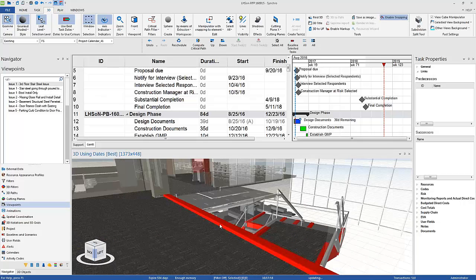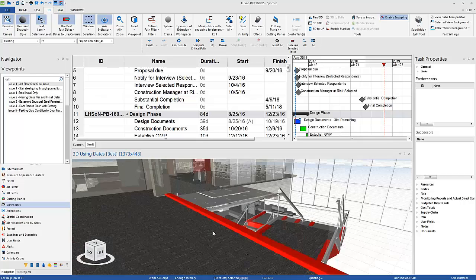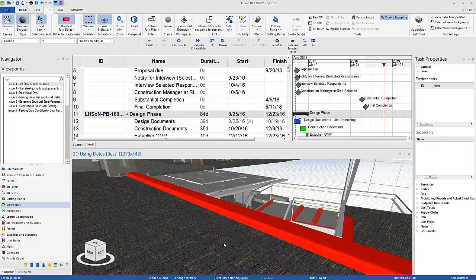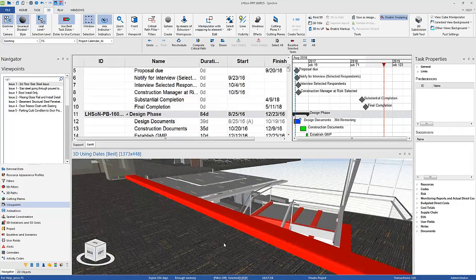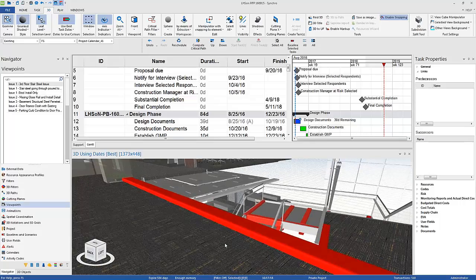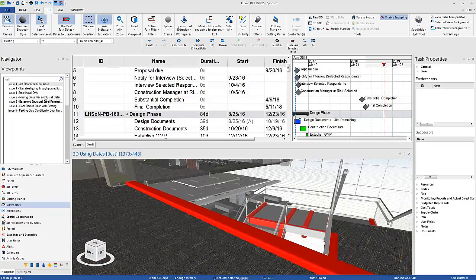So catching this early on again saves us fee, because when you're heavy into the design phase, your whole design team is there. The minute we get into finishing up construction documents, or the design team is done with construction documents, about half of that team or more is gone, and they're working on the next project. So when you're in construction and you're trying to write an RFI, your RFI may not be going to the best person, because the person who may have designed this may no longer be on the job. So that's why it's best to identify issues early.